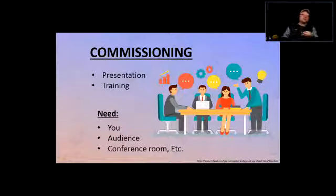But now, when it comes to a phone system, there's a lot involved. It's transferring calls. It's a certain type of setup that is characteristic of this particular model. So you need to train the receptionist on how to use this particular system to transfer calls, make conference calls, and retrieve the voicemail and all that stuff. And then you need to train the facility management and whoever is going to be using that phone. So you designate the whole day on just training, all right?